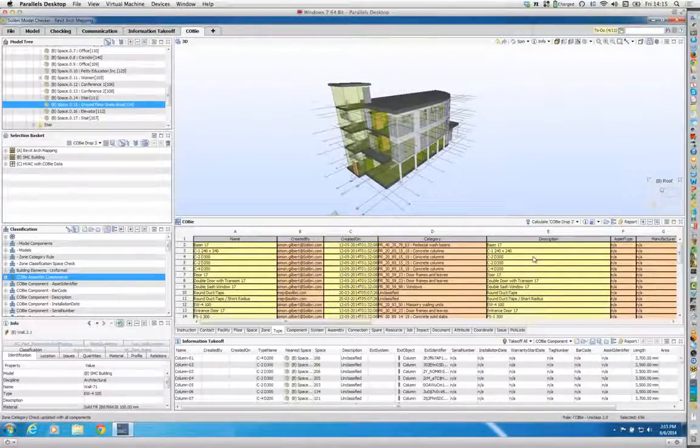Now, what we have generated is a portal, a Cobie portal, which will include the main sheet initially, so you can upload the main sheet, and then you can also upload the individual sheets as work packages. So you get a complete interface which enables you to load in the original main documentation of what's required, and then the individual work packages, and it enables you to assign those work packages to the different subcontractors and track their completion rates of those work packages themselves.